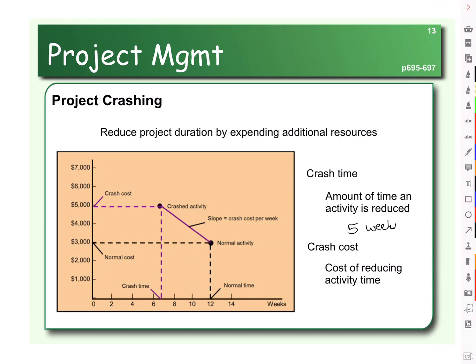Well, if the total cost of cutting off that five weeks is $2,000, then the cost per week would be the $2,000 cost divided by the five weeks. And if we do that, then it'll cost us $400 for every week we shave off of activity one in building our house.